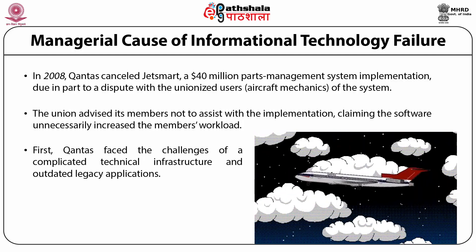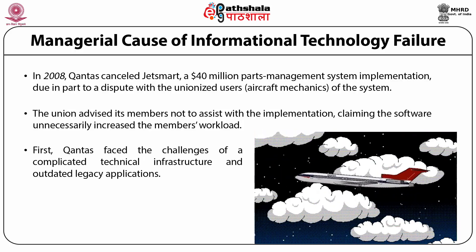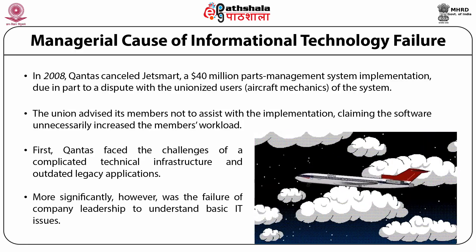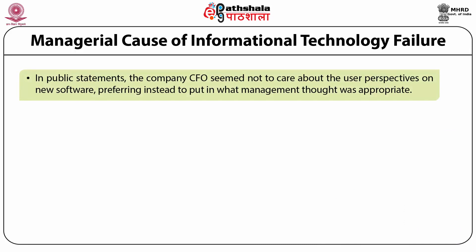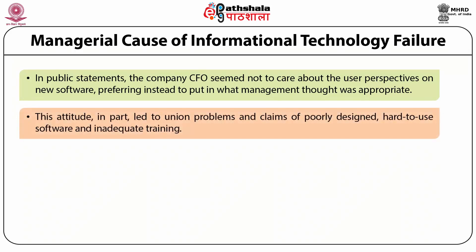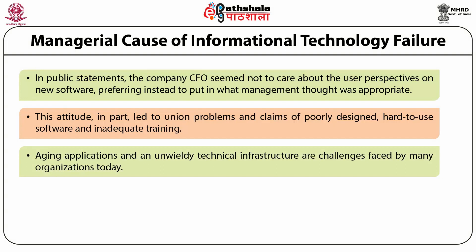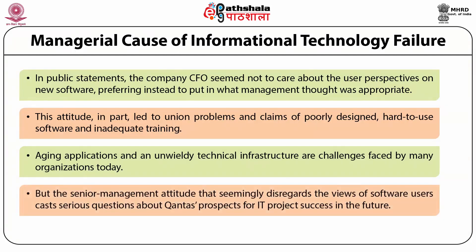An analysis of these IT failures reveals several contributing factors. Firstly, Qantas faced the challenges of a complicated technical infrastructure and outdated legacy applications. More significantly, however, was the failure of company leadership to understand basic IT issues. In public statements, the CFO seemed not to care about user perspectives on new software, preferring instead to put in what management thought was appropriate. This attitude in part led to union problems and claims of poorly designed, hard-to-use software and inadequate training.